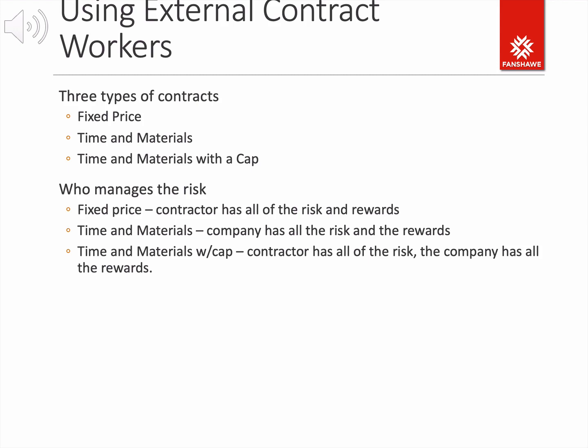So what does fixed price mean? Fixed price is where you'd actually define some specific functionality. So maybe you took a group of user stories, bundled them together, maybe there's 5 of them, and you had a contractor tell you how long it was going to take, and how much money it was going to cost. Then they would provide the time and the price, and you could ask them to do it on what's called a fixed price basis.